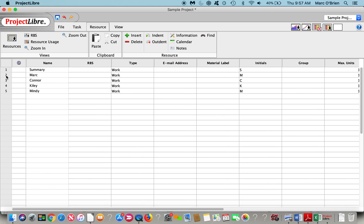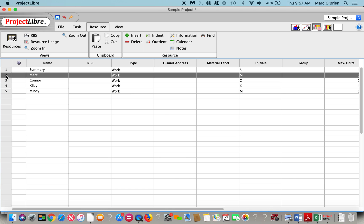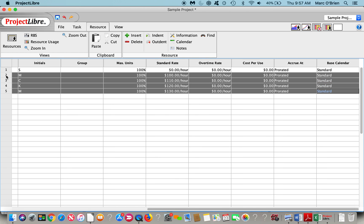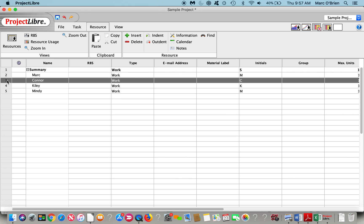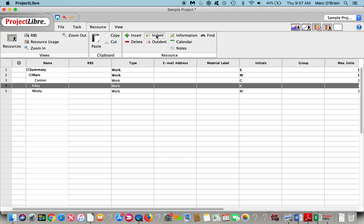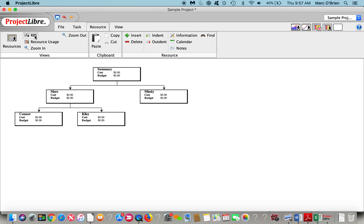We can have the earn value costing prorated or linearly across the task, or we can accrue that at the end or start of a task. Similar to the WBS, we can set up a resource structure here. Connor and Kylie report to Mark. Now if I take a look at the RBS resource breakdown structure, you can see that's there. Once we assign the resources to tasks and start accruing costs, you can see the budget and the cost will roll up to the summary.